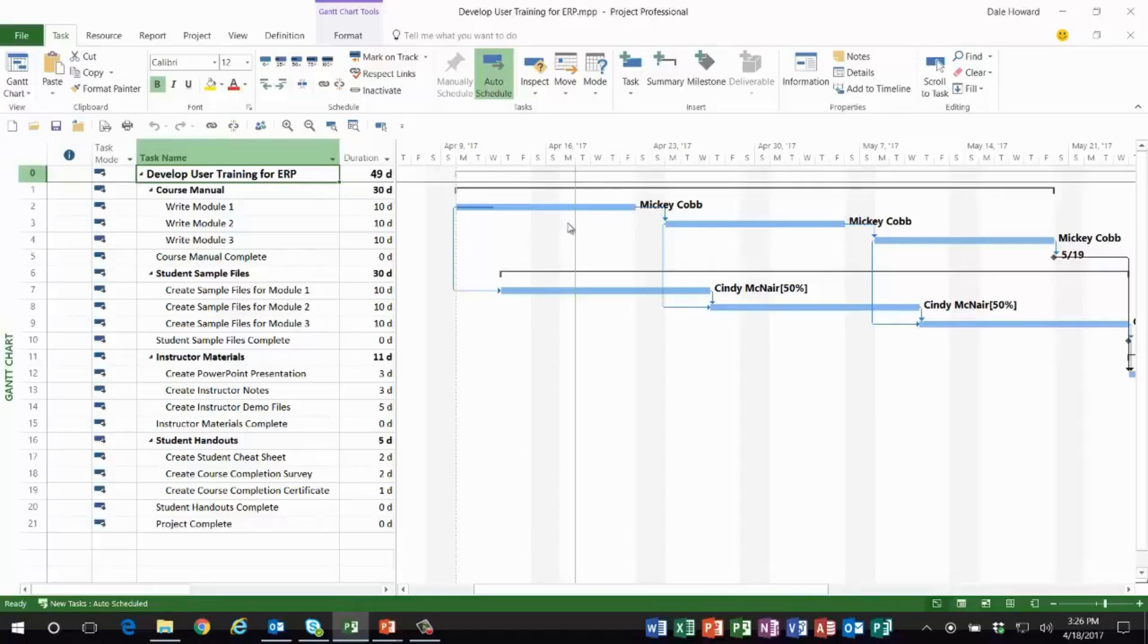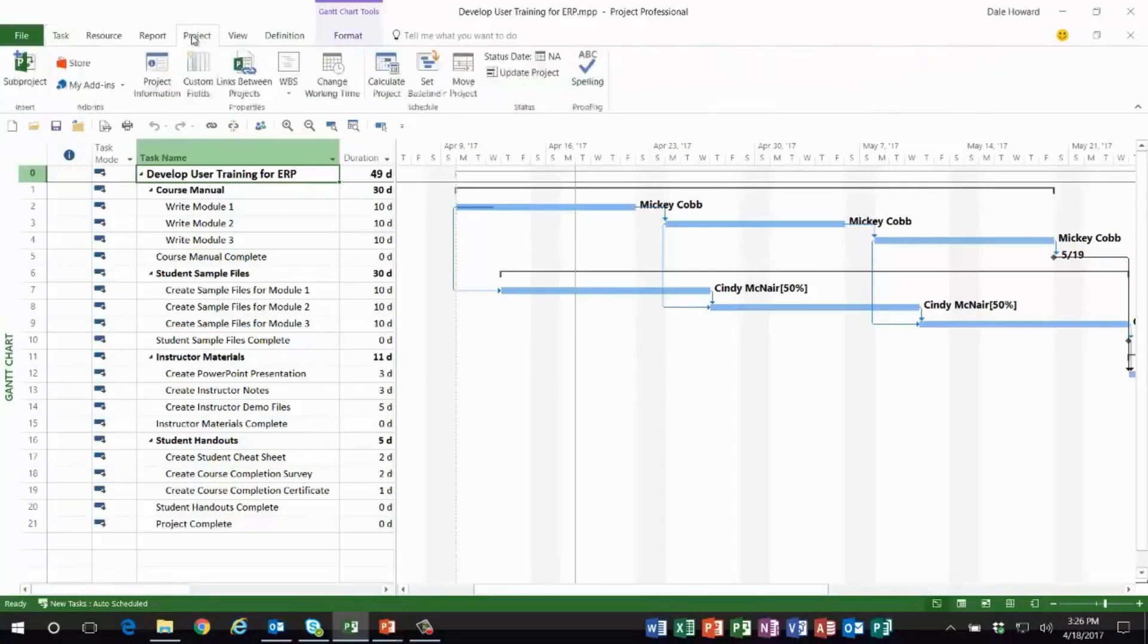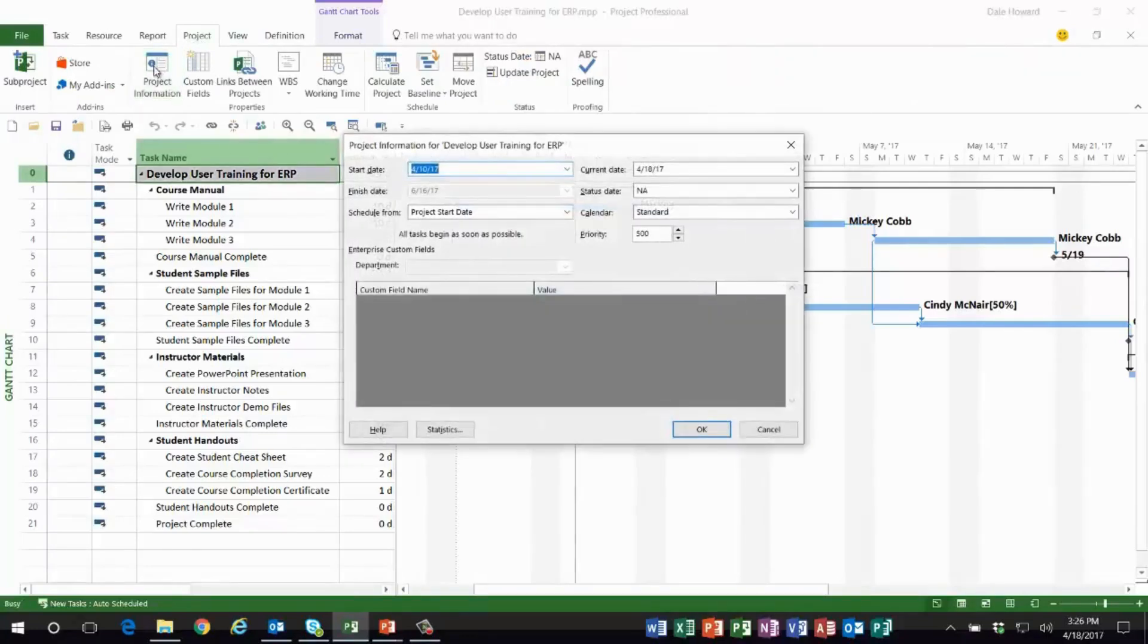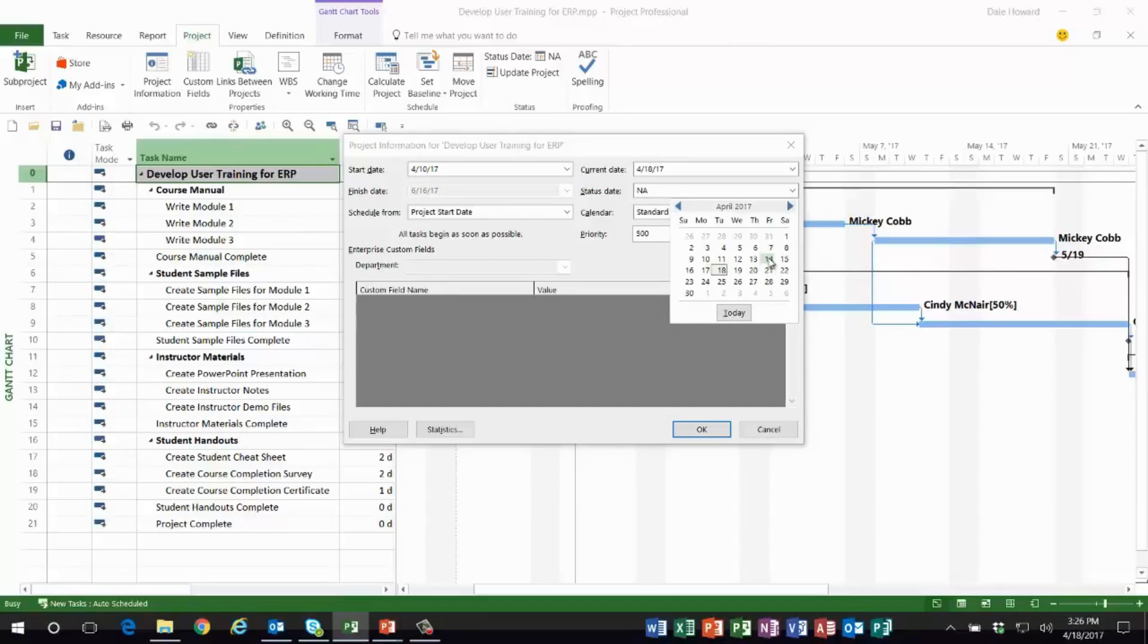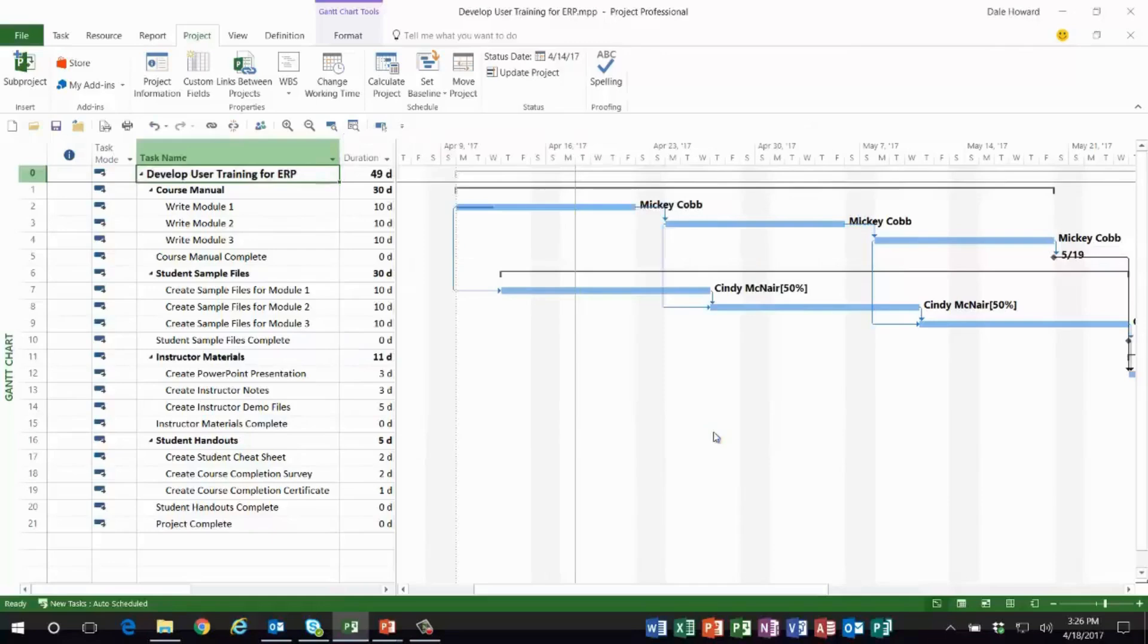her work. So if today is Tuesday of the week of April 16th, I want to set the status date as Friday of the previous week. Here's how to do that: we go to Project, Project Information. In the upper right corner of the dialog, there is a status date pick list button. I want to set this to last Friday, April 14th. Let me go ahead and click OK, and nothing appears on the